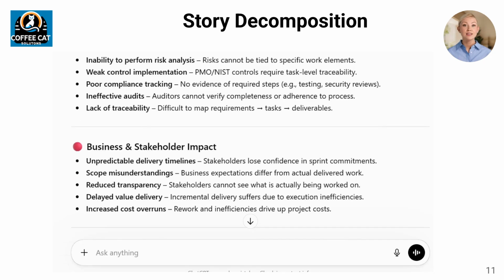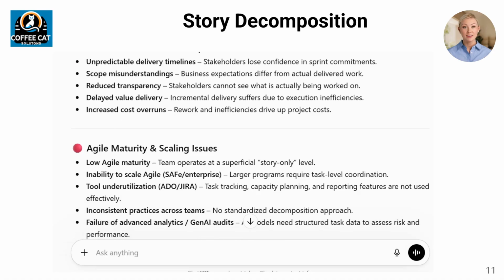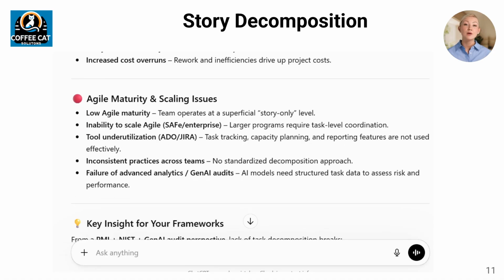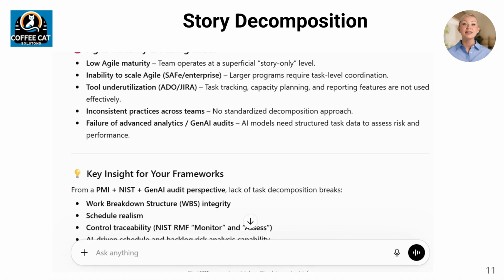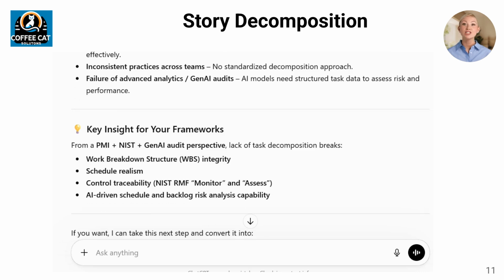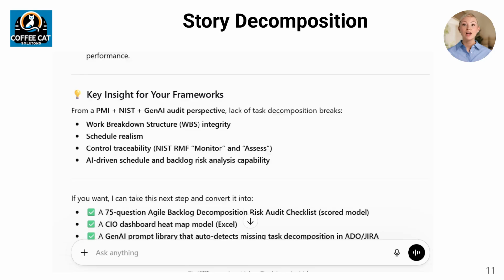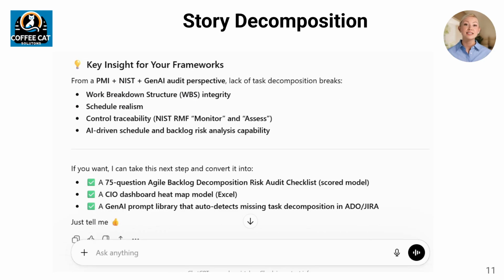Like stories, hybrid project requirements, or functional and non-functional specifications should also be decomposed to the task level, since granularity is needed to reduce project estimation and work product uncertainty. If you have an integrator who insists that they can do your project without wasting time on story decomposition, I suggest having a contract with clawbacks and penalties for timeline overruns, change requests, defects, and functional gaps.